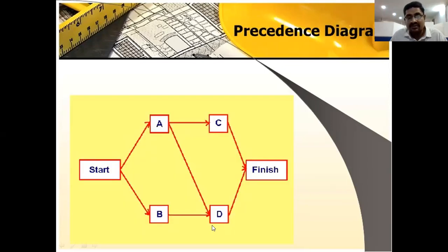So we completed the network diagram. But here C and D are the independent activities. So for preparation of the logic diagram, we need to close these two with a finishing point. These two are completed, but we need to close the whole diagram. For the logic diagram we need to close it, connecting these two with the finishing activity, finish.